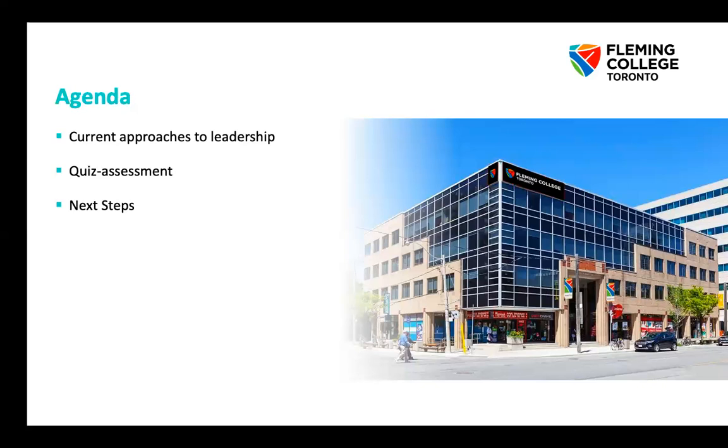In initiation, you need to talk to your very important stakeholders like client, project sponsor. It starts with client and the person who is salesperson or account manager initially. Then usually we talk to project sponsor, and then they allocate a project manager.